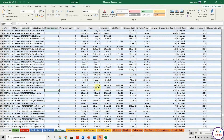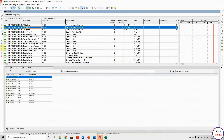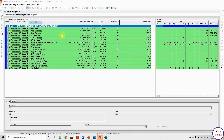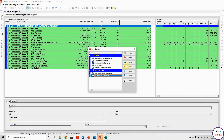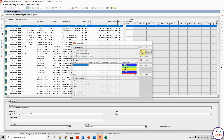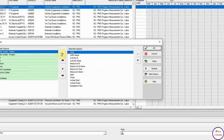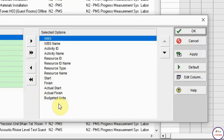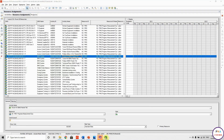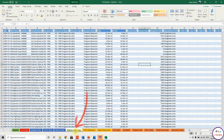I will do the same for all updates — taking all tasks and info data. For resources, I go to resource assignments and open the layout. Again, zero customization. For the budget distribution I adjust the time scale to two months. Then I select all and copy-paste — doing this for the baseline and all updates.